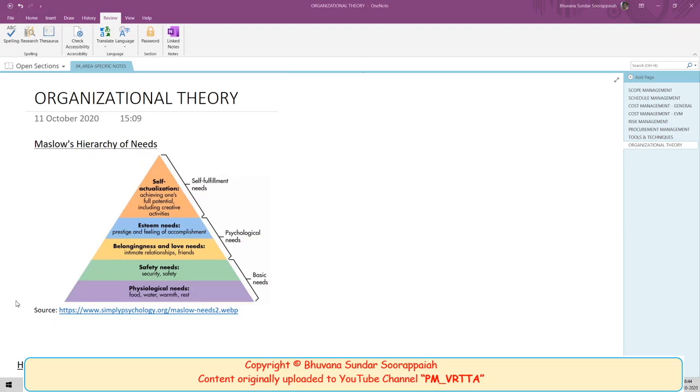So what is the meaning of this? You all know the 5 levels, all of you know physiological needs, safety needs, but what is the meaning of this and what is the interpretation and how does it matter to you? By knowing this, what are you going to achieve? How is your approach or behavior going to change with respect to how you handle your team? That you have to understand. So it says people's needs are usually layered into 5, and always people move from bottom to top, which means unless you satisfy the bottom area of this hierarchy, you cannot motivate the person by giving something high. So unless a person's needs at the lower levels of this hierarchy are satisfied, nothing that happens at a higher level can motivate them.